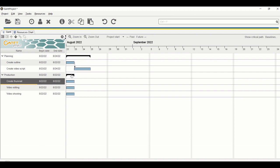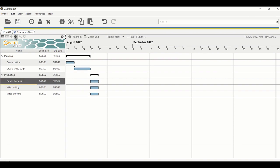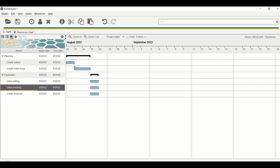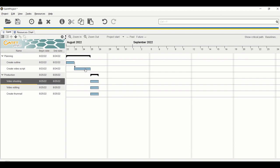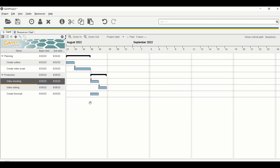Production can only begin once the planning phase is completed. To move a group of taskbars, click on the category lead, hold Ctrl, and move the mouse — all tasks in that category will move together. Now let's create a relationship from 'Create Video Script' to 'Video Shooting', and then from 'Video Shooting' to 'Video Editing'.